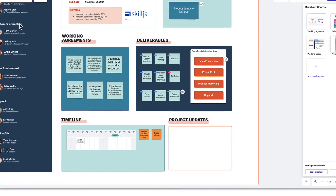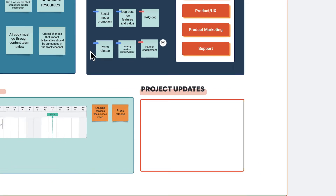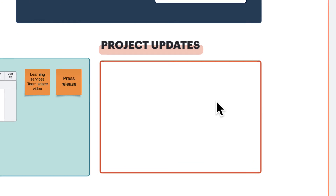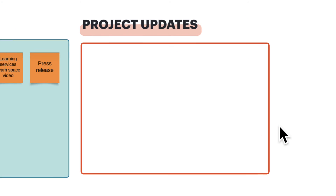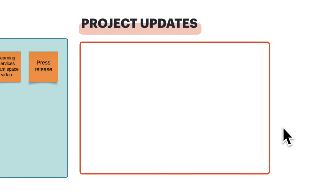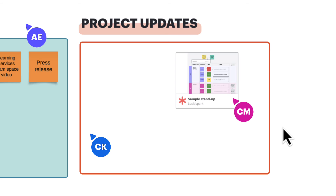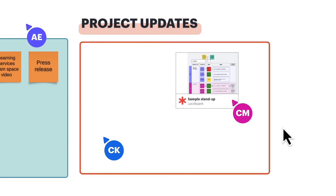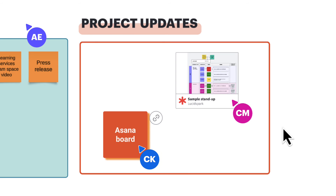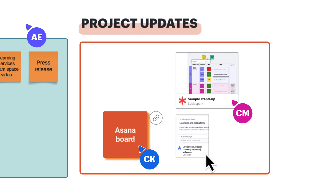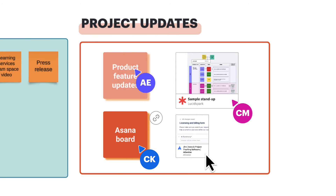The project updates frame is to communicate everyone's progress on the project and should be addressed at every team sync. This is where you'll include links to your scrum ceremony boards, meeting documents, links to task management platforms, and samples of work.